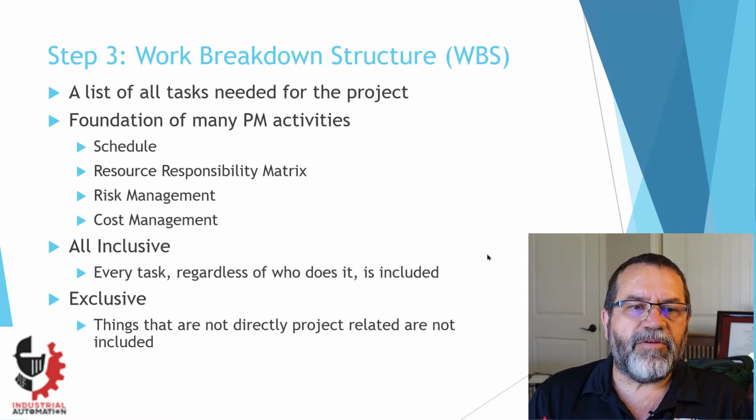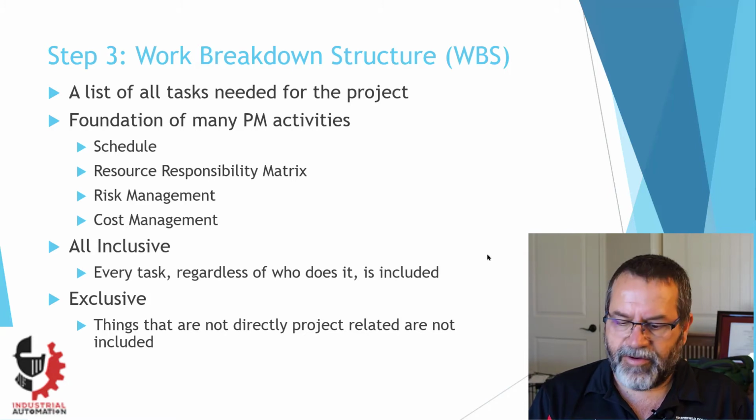There may be some other activities that may take time away from the project team, but those are not part of the project, and so they're not included in the work breakdown structure.